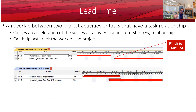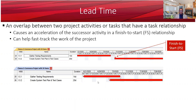However, the question you must ask yourself is: do you really need to finish gathering testing requirements before you can start working on creating the system test plan and test cases? Maybe not. Perhaps when you are almost done — a quarter or three quarters through the first activity — you can start the second activity. In other words, to some extent, do things in parallel to go faster. You use lead time to do that. Lead time is an acceleration, an overlap between two activities that have a dependency.